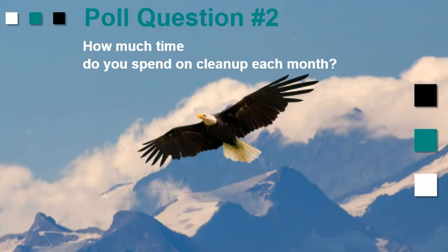Now, another thing I should highlight is if you're a contractor and you want to pre-clean your schedule before you give it to the engineering firm or the client, this tool will help you do that. So you would export it, you would clean it up in the Scrubber, and then you would give it to them. This is not just a tool for an owner or an engineering firm to scrub when they receive. This can be a tool for a contractor when they're giving it out.